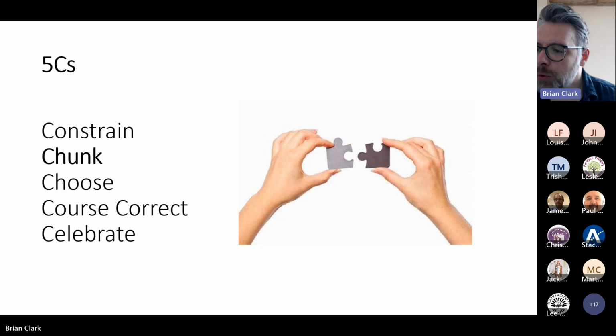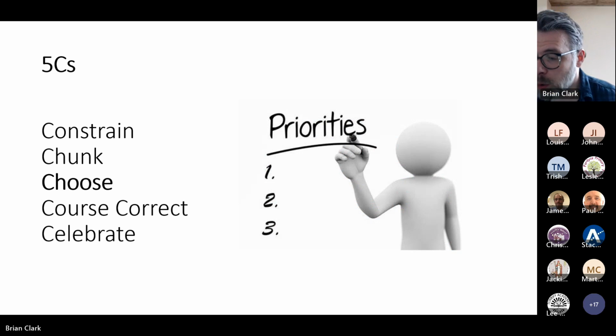So let's say you want to increase the use of accessibility tools for learners and staff, because you want to make sure all your learners with ASN are catered for, but also that all your learners are aware of how to use those tools and all the parents know they are available. That's a constraint, it's a box. You then have to take that task and break it down into its individual components to be successful. Then figure out, in order to do this, which ones are we going to prioritize first?